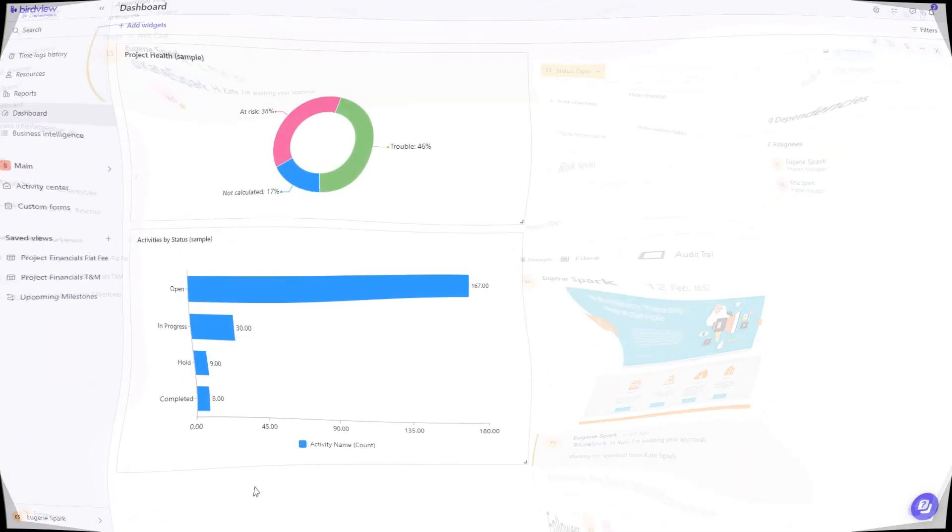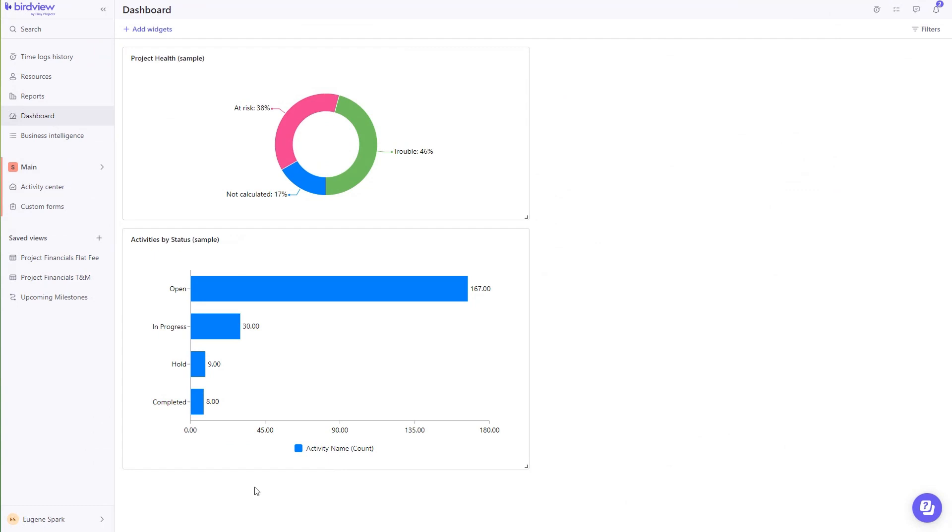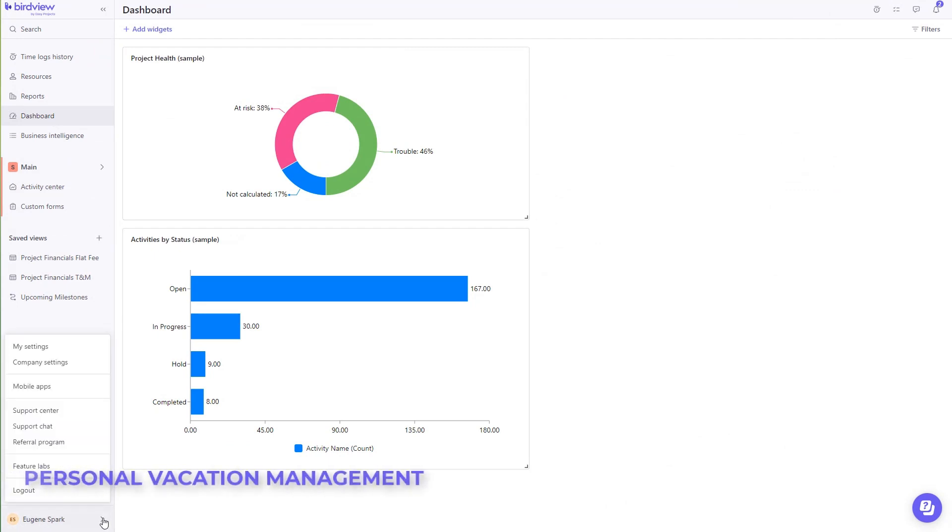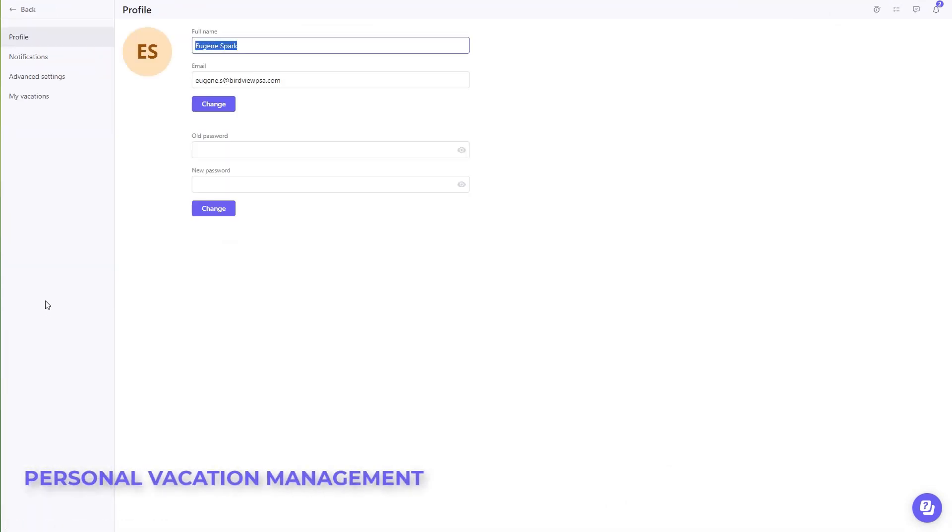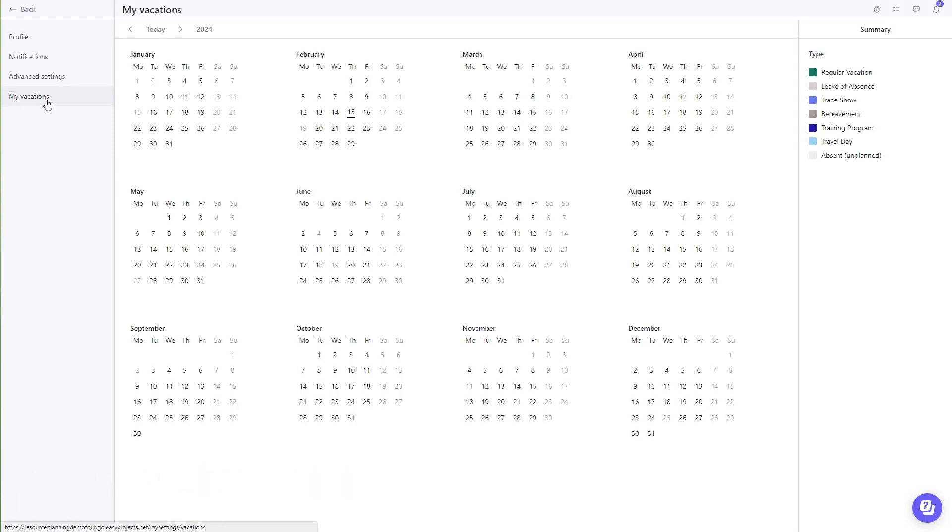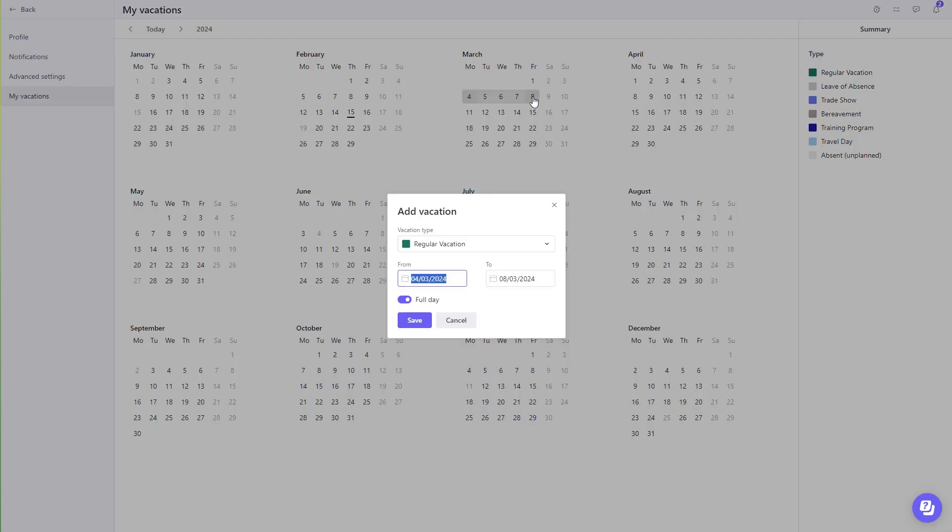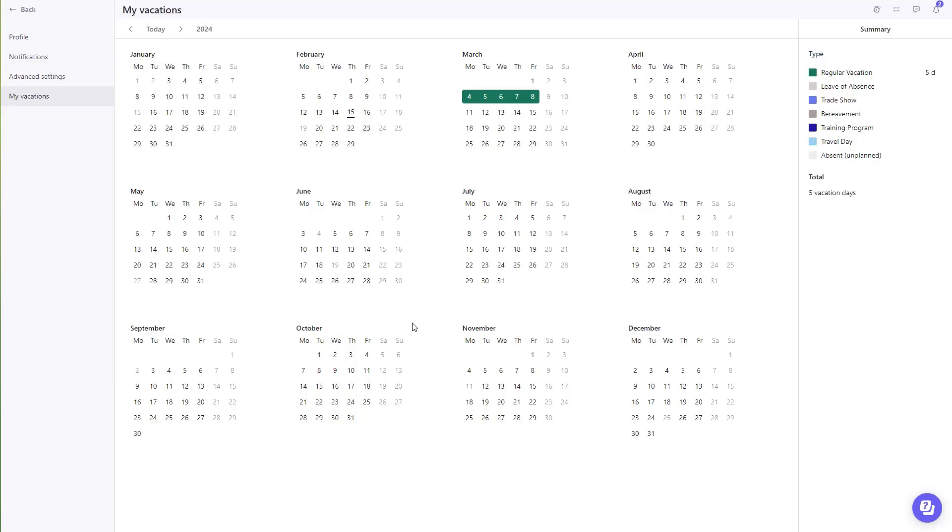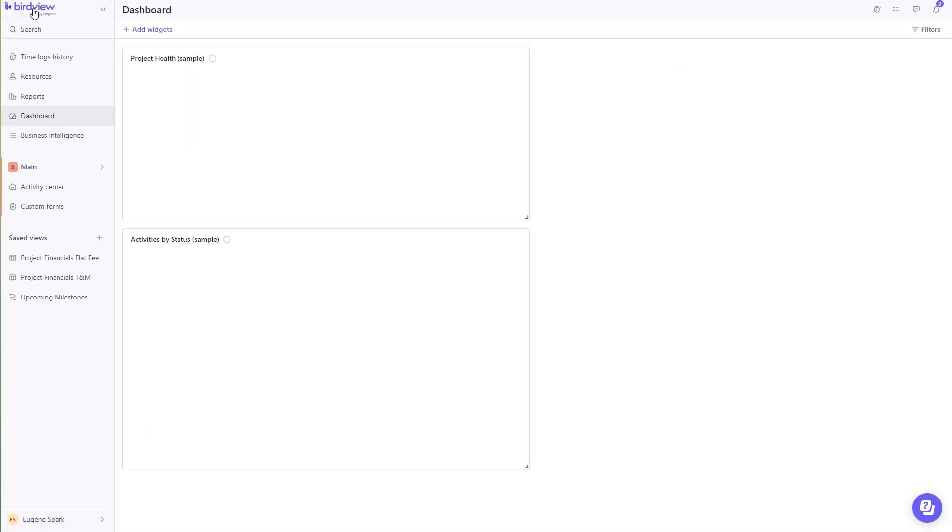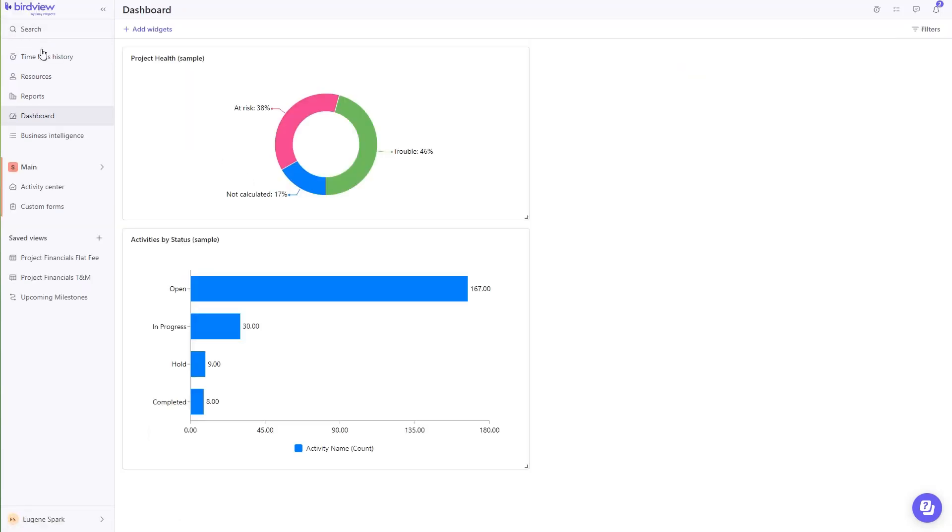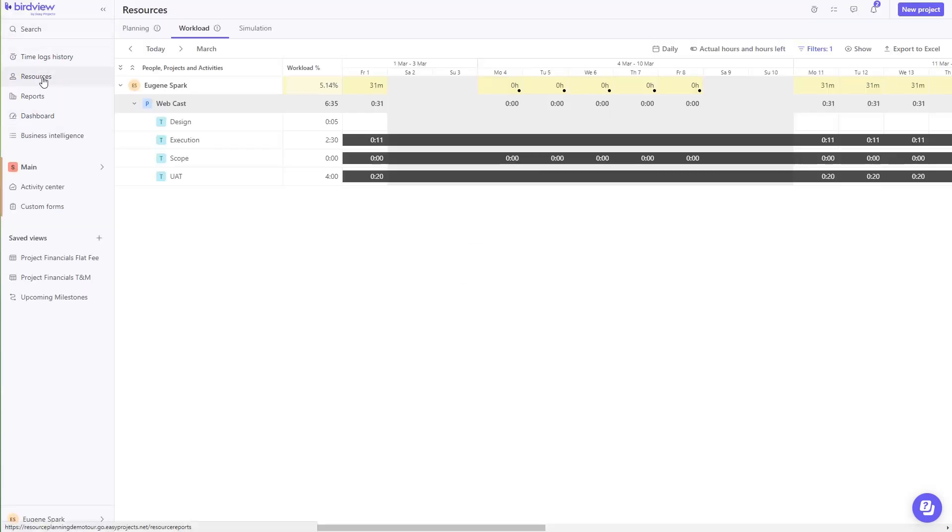In addition, resources can also identify their vacation blocks. Use individual My Vacation settings to be able to identify the period of unavailability, so this will reflect when you are being scheduled hours during your vacation block, as well on the Workload Resource page.